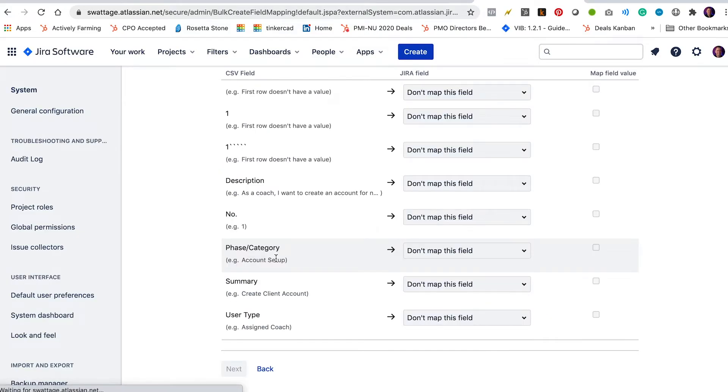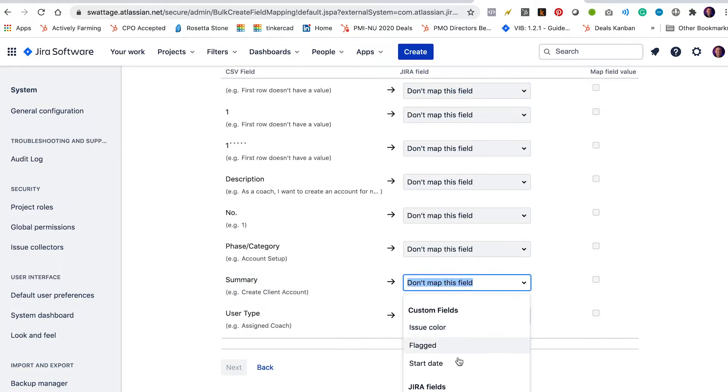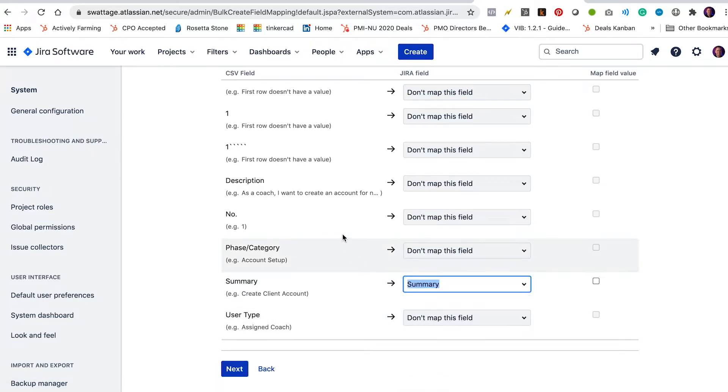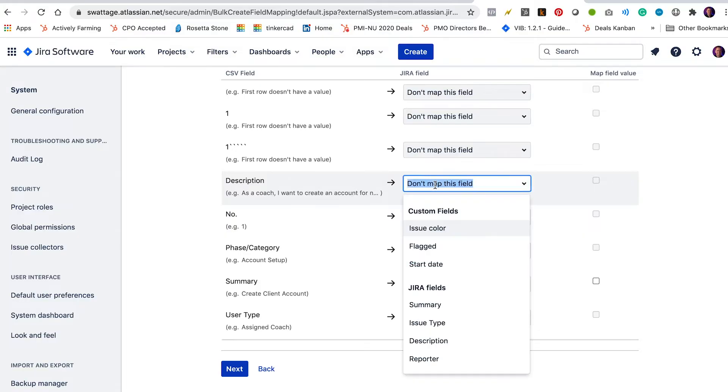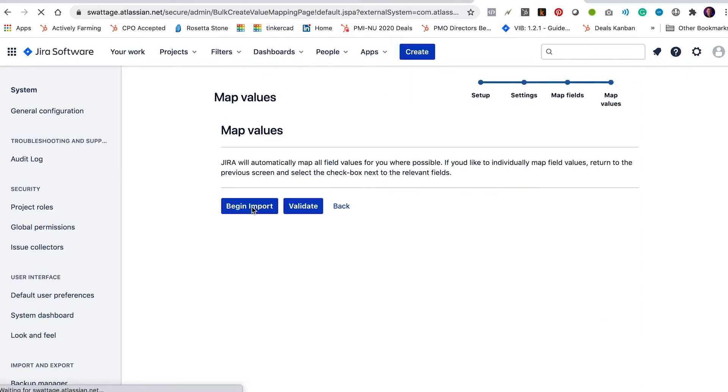Now it's going to ask me to map the fields. There are really only two fields that I need. I need the summary and I need the description. So I'm going to map the summary field to the Jira summary and I'm going to map the description column to the description field in Jira. I'm going to leave the rest of those off. I don't want to import those. I'm going to click begin import.